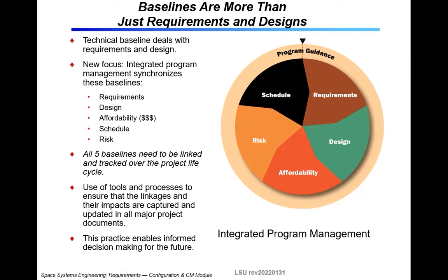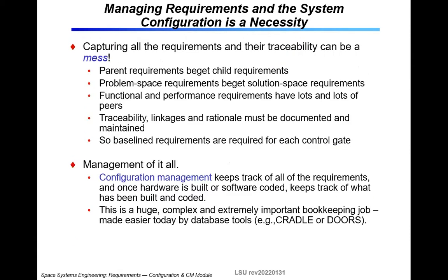There's a lot more in these baselines. You have that technical aspect, but you also have schedule and risk and affordability in terms of your time, as well as the requirements and the design. So there's a lot more than just your electronic circuit drawings or your software flowcharts when you put together a baseline like this.